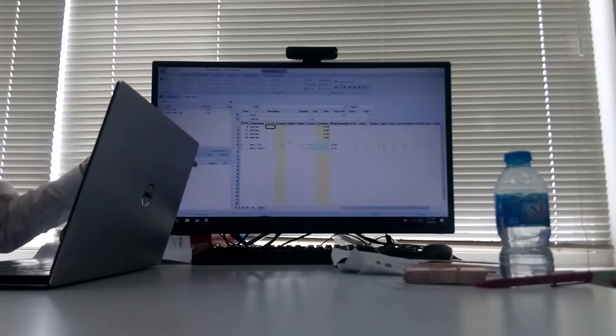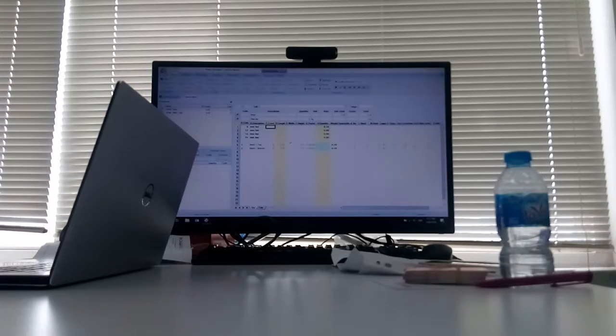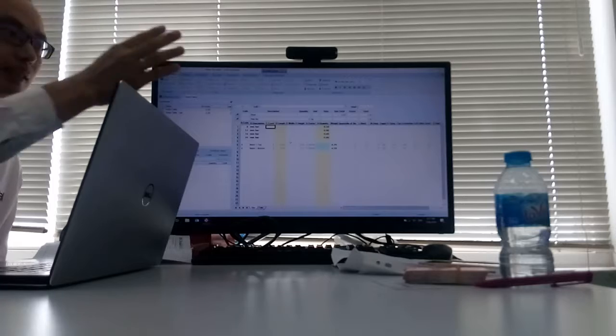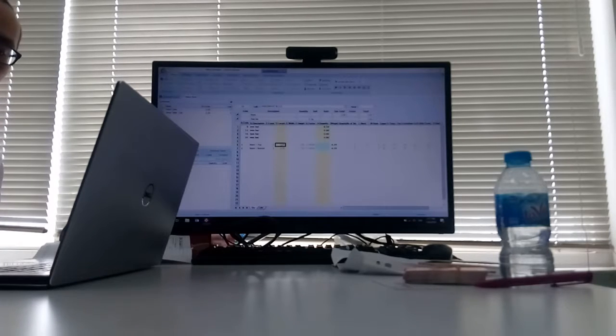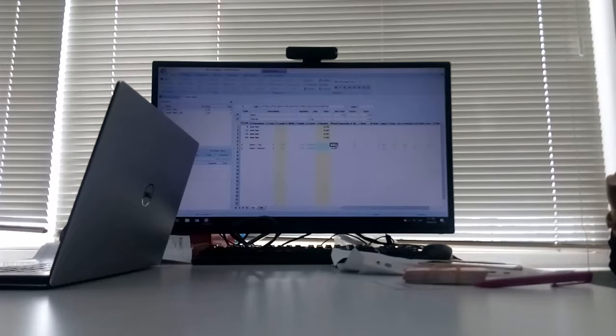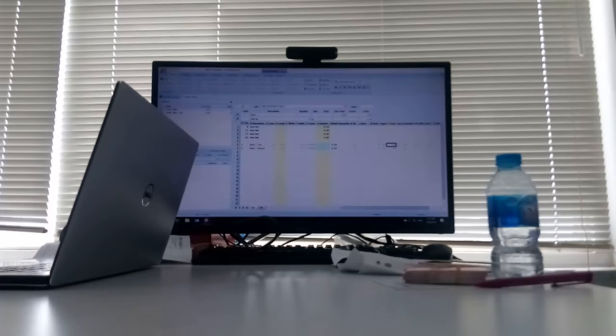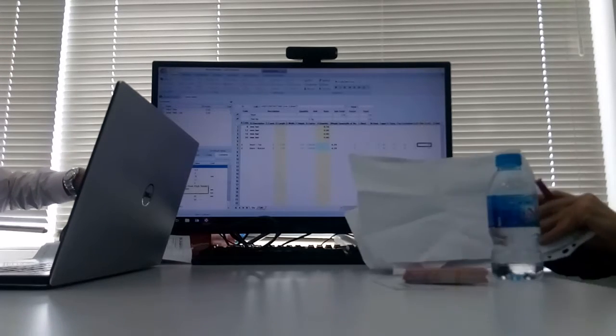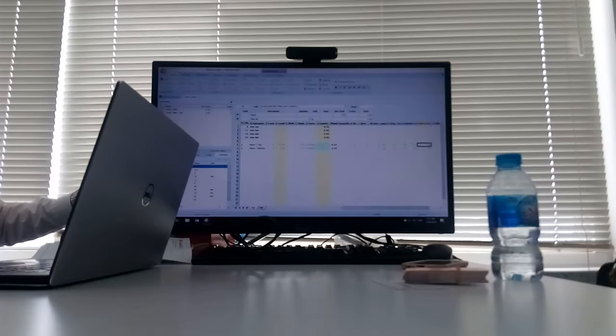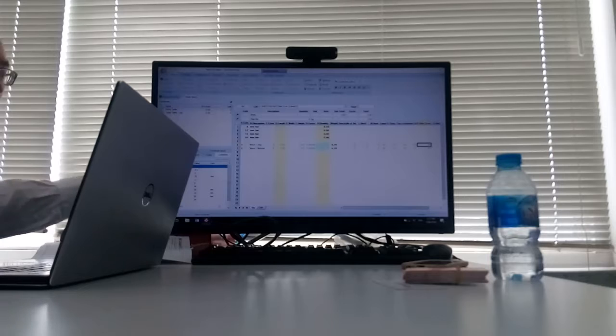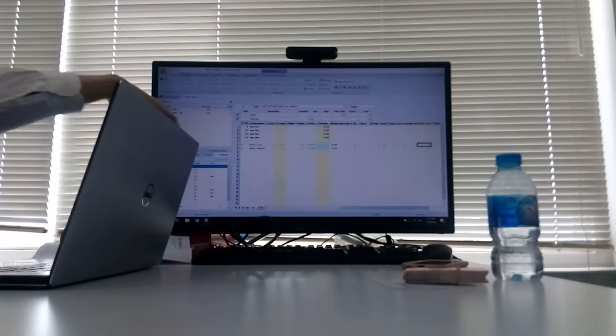It's like any QS that measures manually, you'll create a table in Excel. You just need to move the whole template inside CostX. And from here, you have the option to manually type in the length, width, height, multiplication. The factor is just to convert the length to the width. There's the number of bends, the bends, hooks, lapping, tying, top cover, bottom cover, side cover, you can have all this information linked to the constant, which you have a list over here. Normally when you receive the rebar drawing, the engineer will provide you one table of this. You can just update all this information, which will link directly to your workbooks.